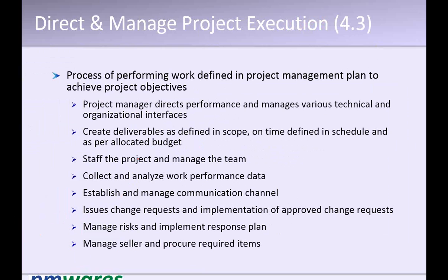We already have a resource loading sheet where it talks about when a person is coming, when a person is going. Why don't we use it? Why are we duplicating this in the project management plan? Let's remove this, because it's just duplication. If I change there and forget to change here, then it will be a problem, right? So we should keep suggesting changes wherever you find logically it is not fitting, or you have some more information which you think the templates can be improved upon.